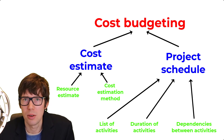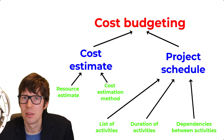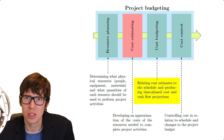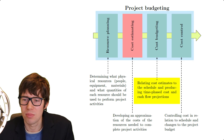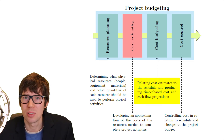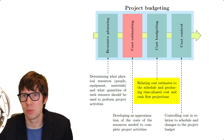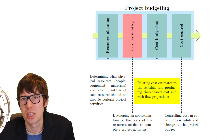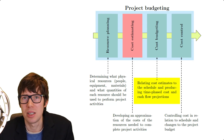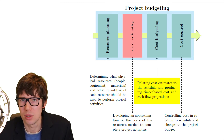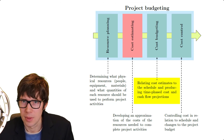Once you have those three inputs, you can create the schedule. And once you have the schedule, you can combine it with the cost estimate. The cost estimate tells you how much the project is going to cost, and the cost budget tells you how much money you're going to spend at each particular moment in time during the project execution phase.